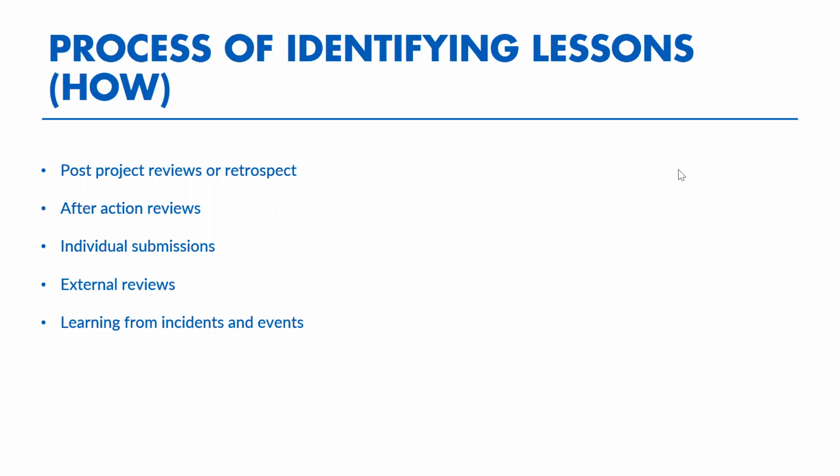And therefore, going forward, what they have learned from this is that they need to build in an inception period, which doesn't factor in implementation time. So 6 months plus 3 years is what will allow the projects to form these collaborations and also to implement for the full 3 years.